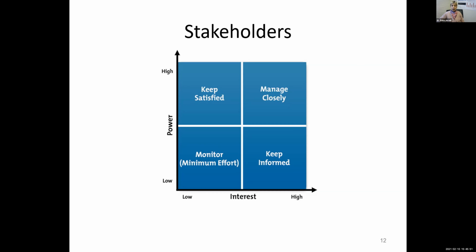And the strategies you come up with for dealing with different groups of stakeholders, it's something you keep between you and your team. This is not something you're going to put on your project charter. You would talk about the stakeholders and their titles and their authorities on the project charter, but your strategy for dealing with them is something for you. It doesn't appear on your project charter.